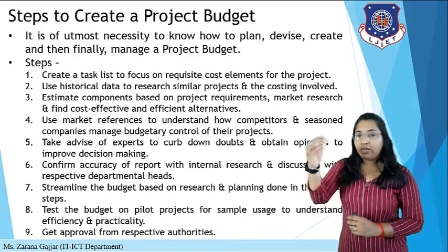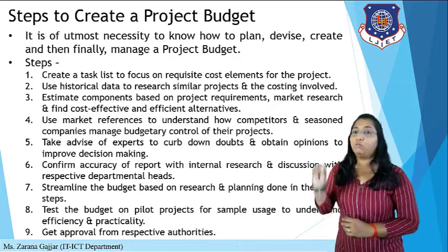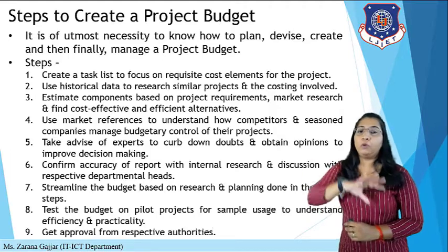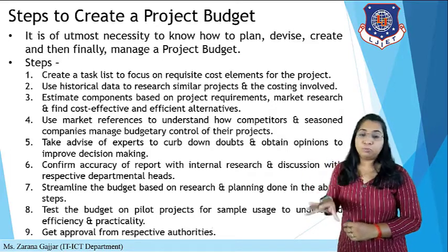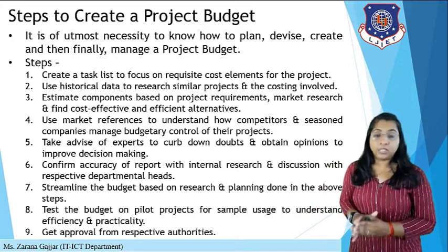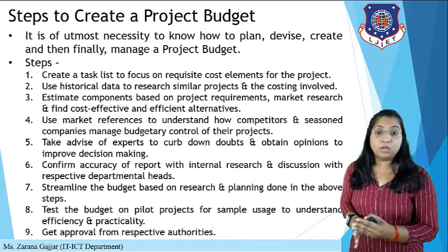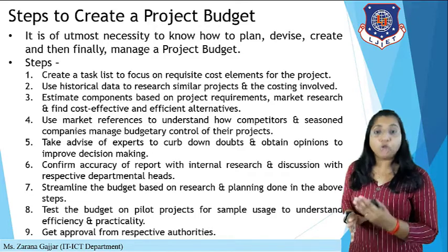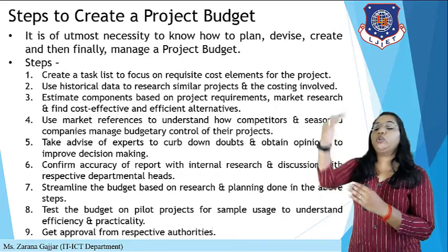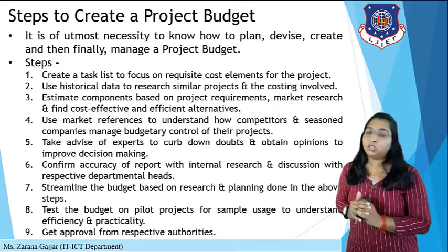Okay, so as you are dividing all the tasks, you are able to recognize which amount of resources you require. So for the designing team, there will be some percentage, so you need to pay them. For the testing team, you require a team of like 5 to 6 people, as well as devices like any mobile device or tablet or any system or laptop. Also you require some applications or an operating system or automated tools for testing the software. So first of all you need to create a task list, and based on the tasks, you can recognize what amount of cost we require.